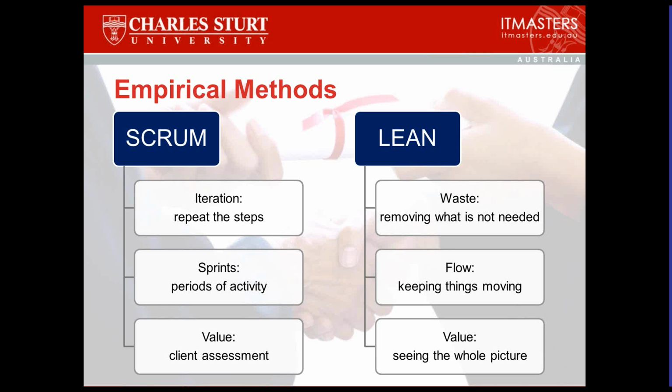respond and adapt when the client says, well, we're going to ask for something a little bit different now, and we're hoping you can still do that within budget. Well, of course we can do that within budget, but this other thing that you also wanted, we can't do that as well. So we can change that, right? We can not give you this other thing, but give you this, and that's fine, says the client. Yeah, I've changed my mind. I don't want that other thing anymore.